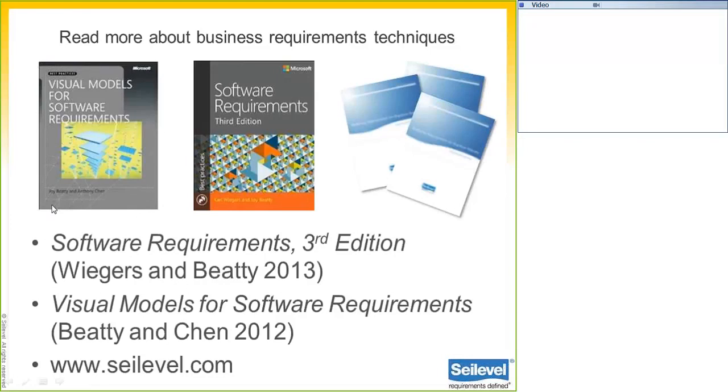So, you may only create a feature tree for your functional requirements, but on the project I was on, it actually made sense to bring some of the user requirements up into the feature tree, because it was important for us to consider some of the business process changes that we needed to gather requirements around. So, I would say you could build the features at any level of the hierarchy. There can be any logical grouping of any of the 3 levels.